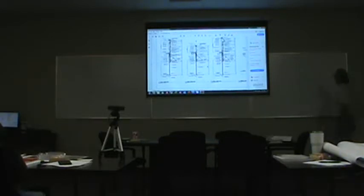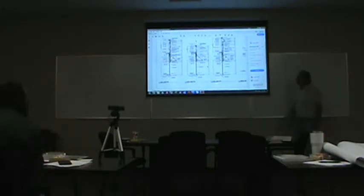Now, let's talk about float. How much float is there in the roof curves? 9 days. 9 days, very good. How much float is there in the roof block? Seven. These all have to be done by 10:10, right? That's the late finish. So we know that this could potentially start when? 10:07. This could potentially start when? 10:01.